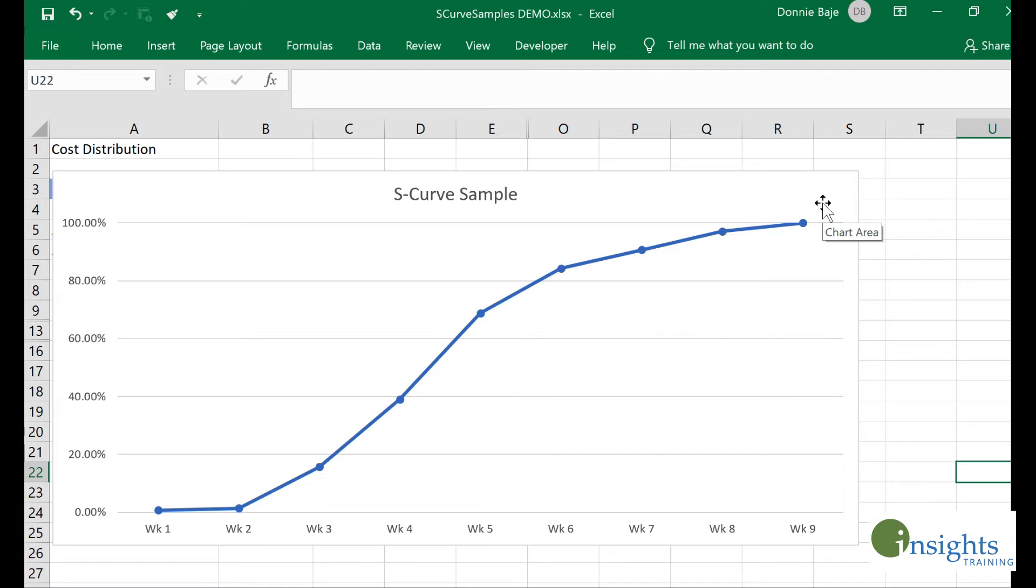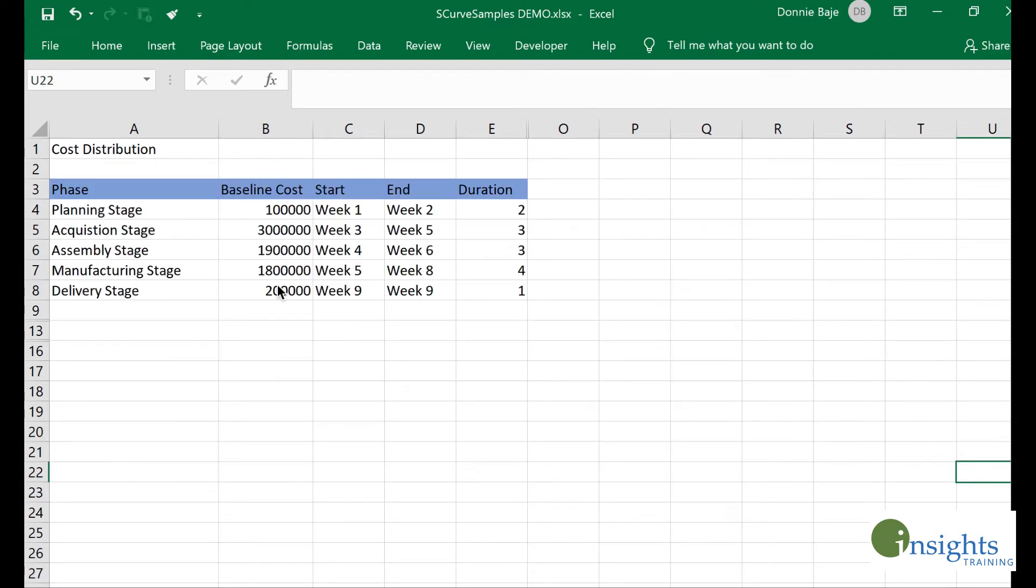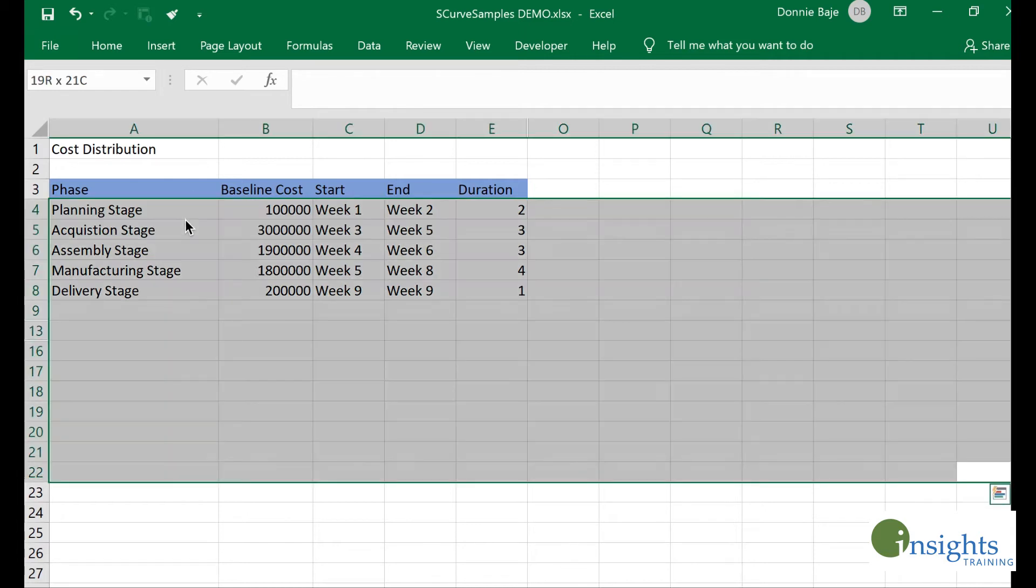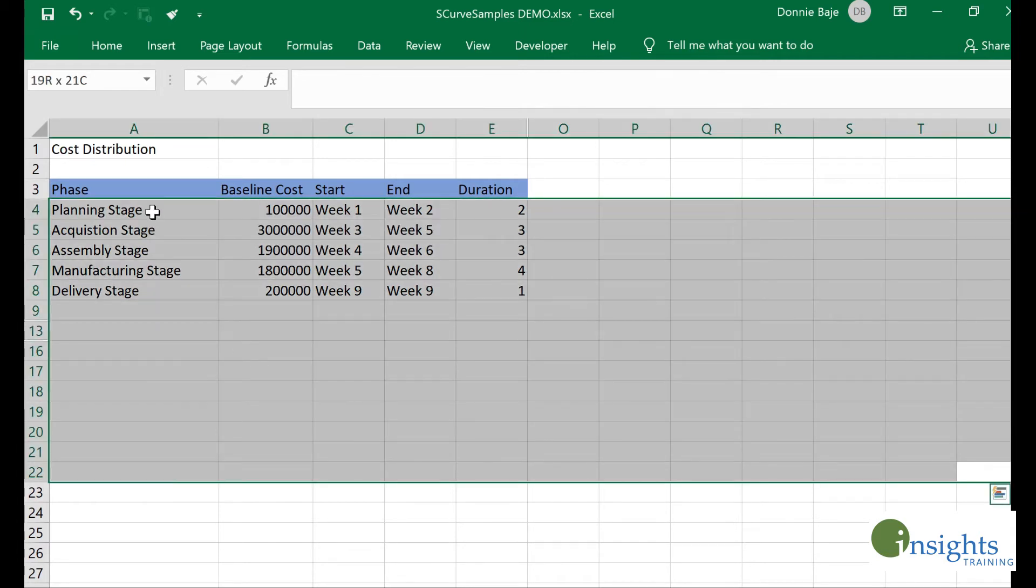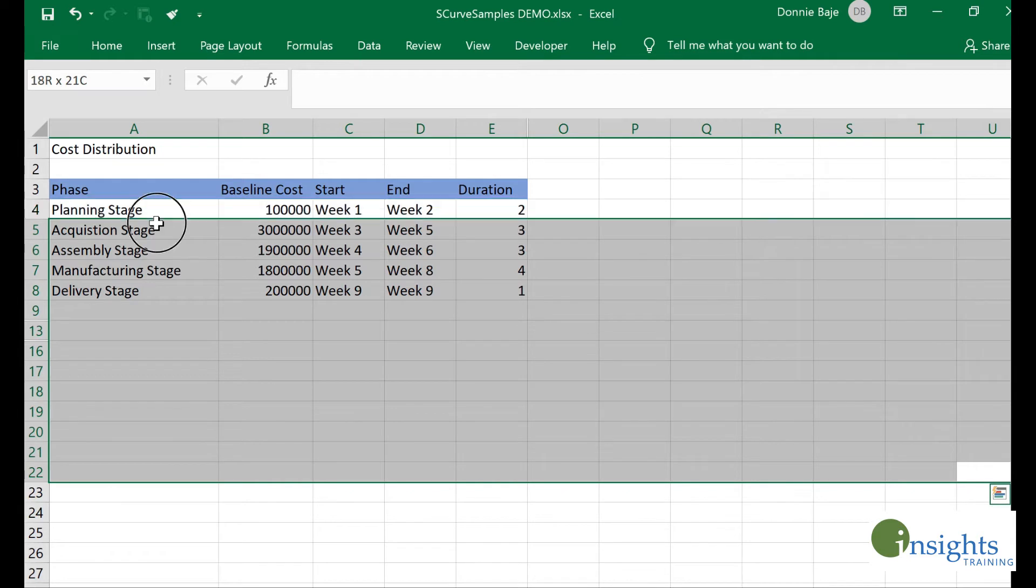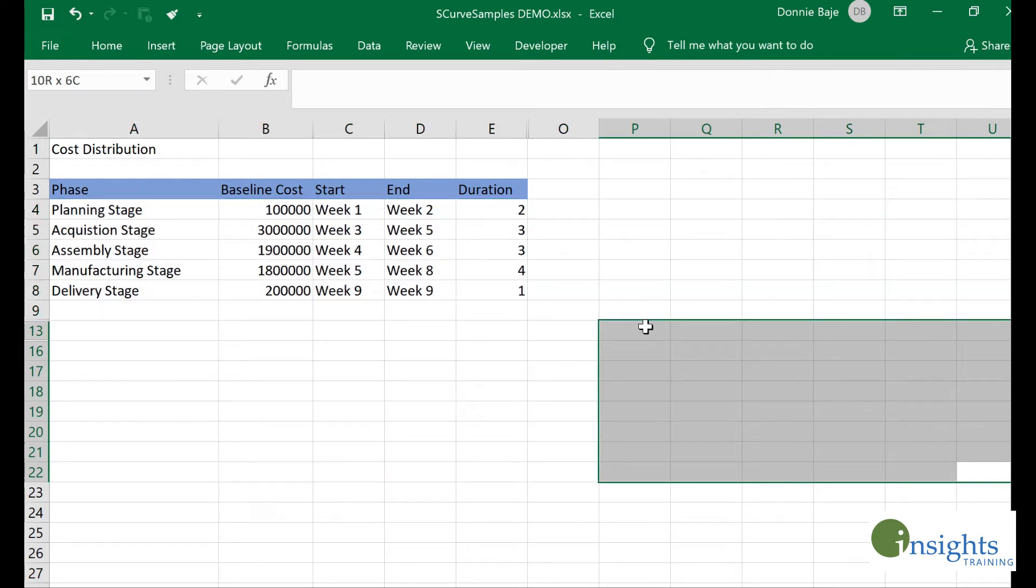That is what we're going to discuss: how to make an S-curve in MS Excel, a very widely used program for creating charts. The first step of your creation of an S-curve is to create the different stages or phases of your project. Here I already have a created table divided into five stages.